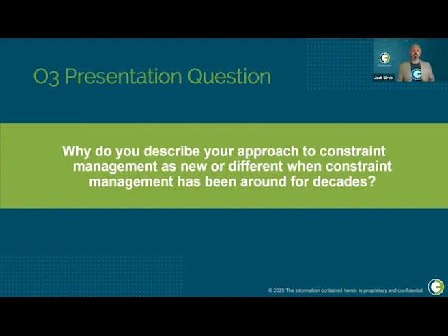Then there are other tools that provide constraint identification, which is essentially a checklist. So I know for this installation work package, I need materials, I need access to the workface, I need my drawings, I need my permits. In that instance, you can go through and check a box to say, yep, I've completed my checklist, so I can issue this package. But that's not managing constraints, that's identifying those constraints and whether or not they have been completed.